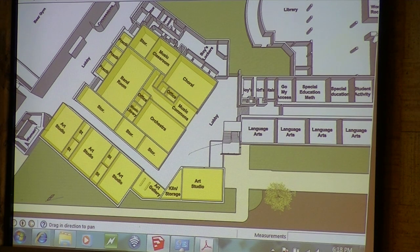Again, music spaces require volume. You know, you need an extra height. And of course, the gym has higher ceilings in it. So that gives it, and it actually turns out to be cheaper than, we've got some pricing from Dewey. Saves about $200,000 from placing it behind in a more remote location. So it's a win-win. Needs to be designed.